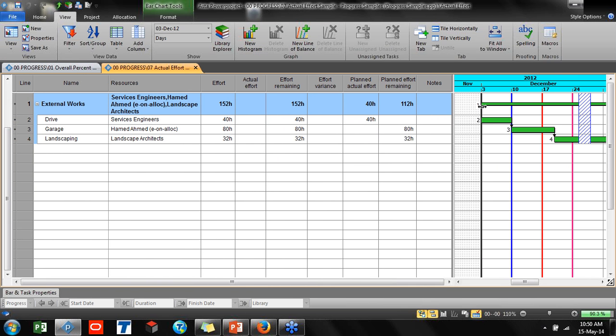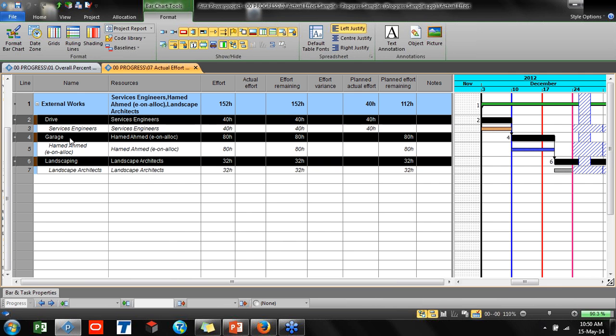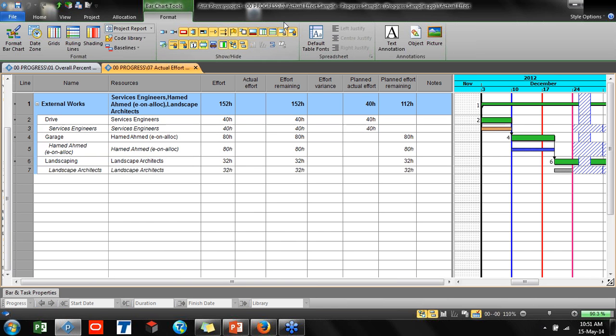Now we are going to put progress in the plan. We already saw our modeling types. When we look at our tasks, these are our tasks, and the other bars are our resource bars. Here there is a holiday. Please see, this is the task calendar, and here is the resource calendar. So task and resource can use different calendars. If your task follows the resource, then based on your resource calendar holidays, your task can be increased or reduced.